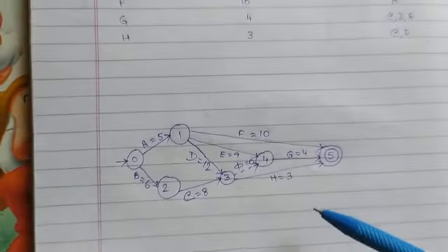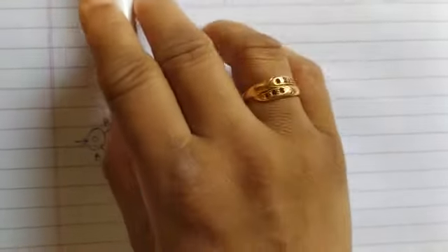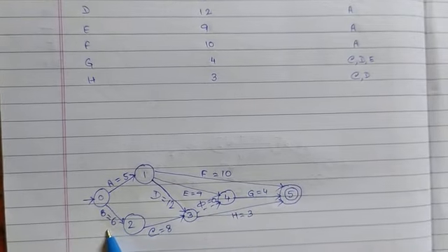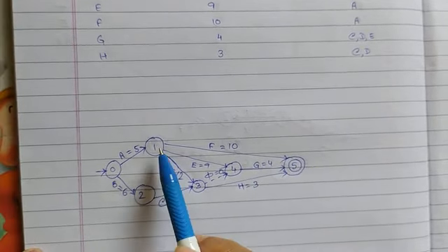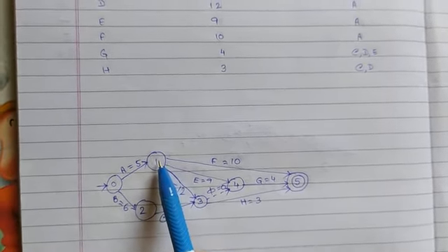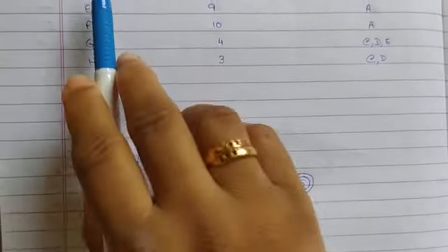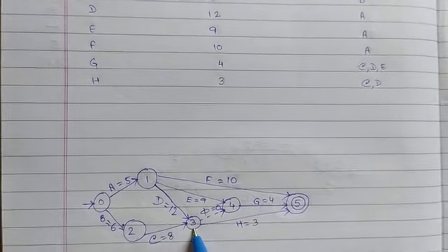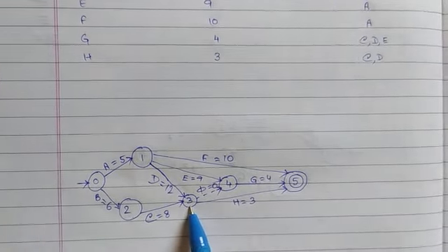Now look at the Pert chart. Provided that the question is, A and B have no preceders, that means A and B will execute from the starting state, and it has created two new states, that is 1 and 2. C's preceder is B, so simply C will execute from B and has created a new state.